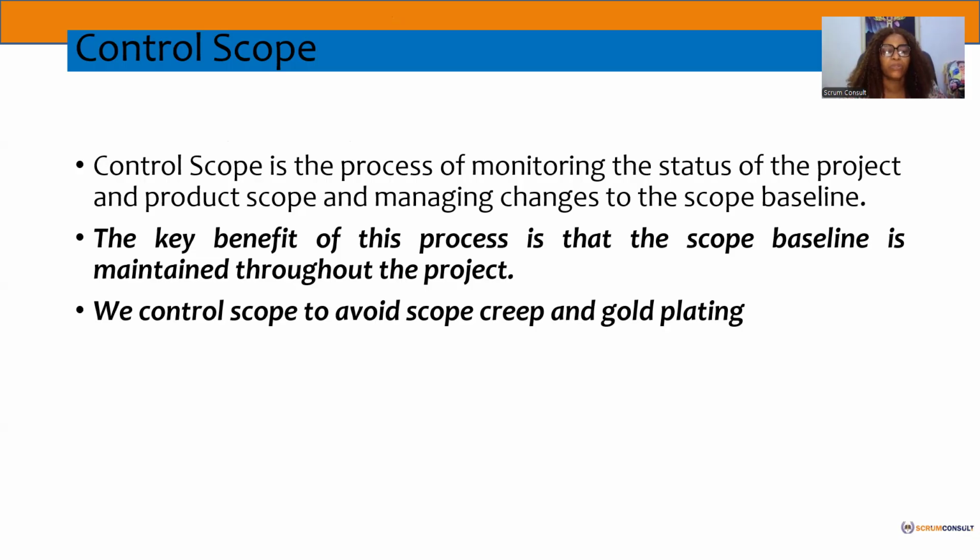On behalf of this change management board, so you have your control scope, which is a process of monitoring the status of the project and the product scope. At this point we are just controlling scope. It is the process of monitoring the status of the project and product scope and managing changes to the scope baseline. The key benefit is that the scope baseline is maintained throughout the project.